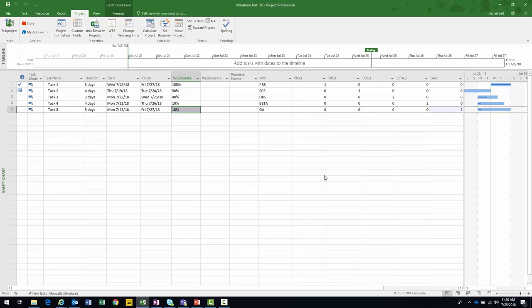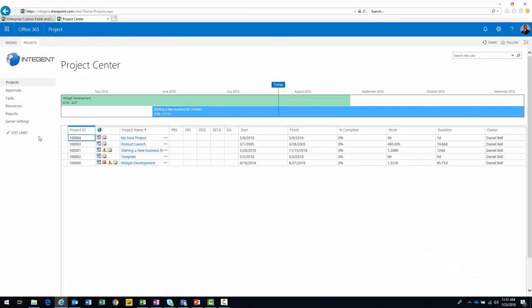This took a little bit of work, right? Because you're creating 2 custom fields per milestone. You have to create the lookup table, and you have to assign the milestones to each of the tasks that you want to have a milestone. However, once the custom fields are set up, okay, and once you get that established that everything's working and tested successfully, then it's just a matter of assigning them and maintaining your project, and then being aware as a project manager, right, that you have this project that has milestones assigned and you need to start checking them.